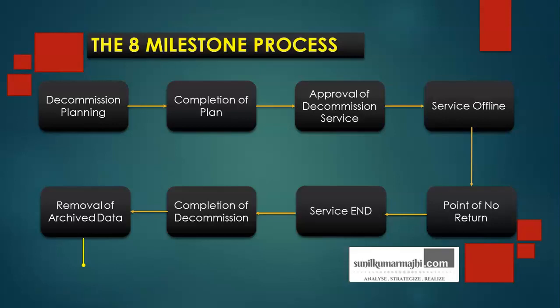Now here one thing I wanted to highlight: whenever a particular software is retired or decommissioned, it is not a one-time activity, it's not a one-day activity. This activity is performed in phases. Firstly, the new system would be partially implemented for the end user. They would check the behavior of the end user, then take feedback, then improve the newer system. Then gradually, bit by bit, component by component, they would be upgrading your older system.